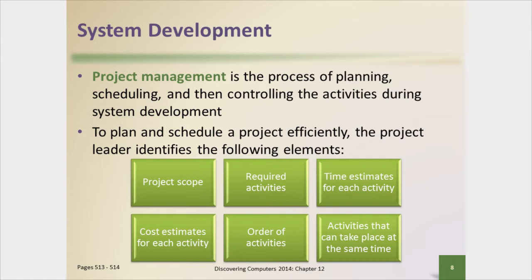The example I used in class was, if you're building a house, you can't really hang sheetrock at the same time as or before you've put up the studs. There's nothing to hang it on, so you have to have the studs in place before you can hang the sheetrock. In some cases, though, activities can take place at the same time. You may be able to brick the outside of the house while you're hanging sheetrock.